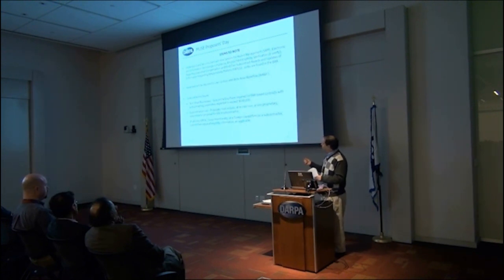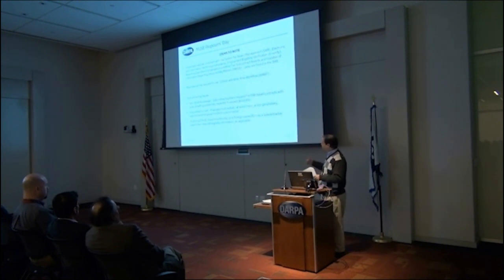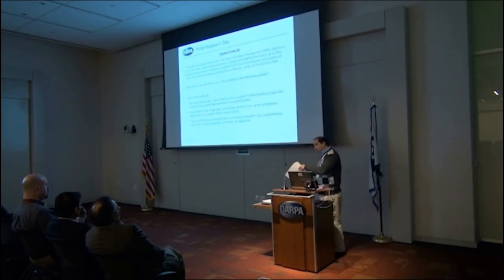And also an important point, and it gets dropped a lot, there's only so much time to put the proposals together. And that's the subcontract cost proposal. So you have a responsibility, if you have subcontractors, that you are gathering up subcontract proposals, legitimate proposals, not rough orders of magnitude, not letters that say that I'm a team member, but an actual proposal that is built up in the same format that you as a prime are putting together, same rules that are in that solicitation apply to subs, is that you need to make sure that you have that in your submission. In most instances, the subs aren't going to want you submitting a version that has proprietary information, rates, and factors. You probably aren't going to get that, but you'll get sort of a non-proprietary version, and that's what you're going to include in your submission.